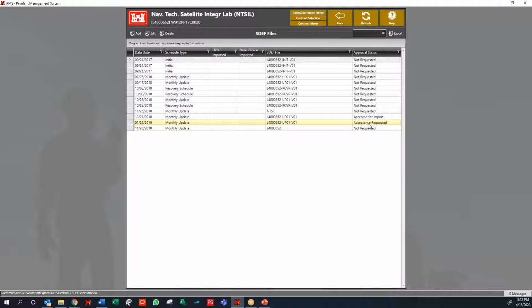I have had clients in different districts that require the schedule update to go in with the pay app itself, which makes it kind of goofy. If there's an issue, it might hold up your pay app. So obviously it's how the Core wants to receive the information.